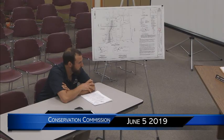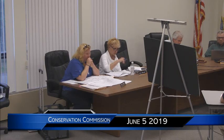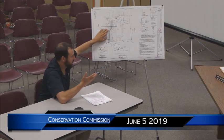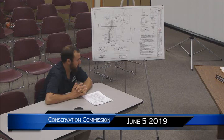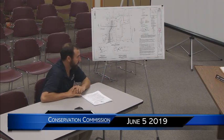As long as we can nail down where we're going to have the transition, I think that's the critical piece. And for the clarity of the contractor, if you approve this, we need to give an approximate distance from the dock. And for the construction plan set here, we can move that note to better distinguish where that is going to be, and we can even set a grade stake at that location and point that out, because again, it's a very tight, narrow little area there.